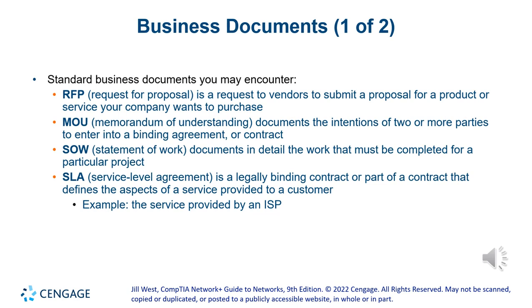This is an agreement between the two of what each one of them needs to provide, and what role each one of them plays in that agreement. It's like a contract, but it says, hey, okay, I'm going to provide the wireless, but Miami-Dade needs to provide the cabling for us. We're going to tell you where the cable is needed, and then you provide the cabling, we provide the wireless.